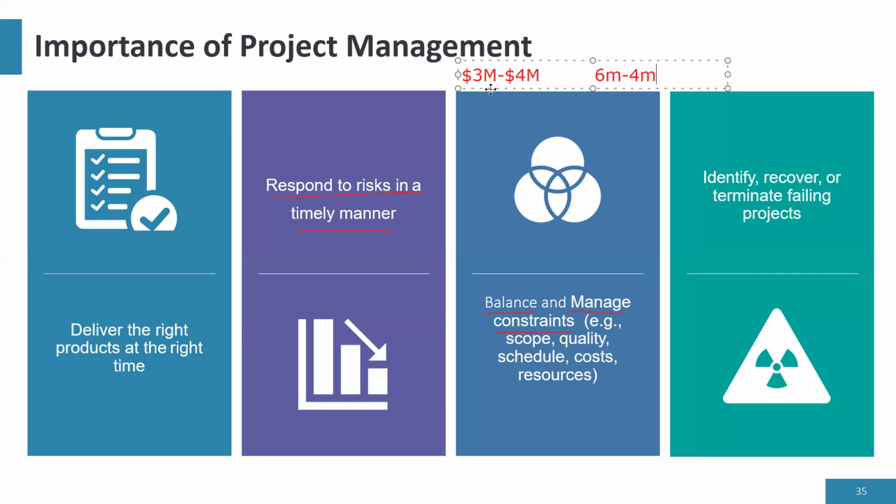And some of the processes too, some of them can also work pari passu. Maybe for instance, if you are pouring concrete, this and that. So that's the way you shorten time. So you have money to work with. So as much as I'm trying to spend prudentially, I don't just like throwing the money around. In that case, I think I might be able to deliver within that time. But always putting in mind, the focus is I have to deliver within 4 months, instead of 6 months.